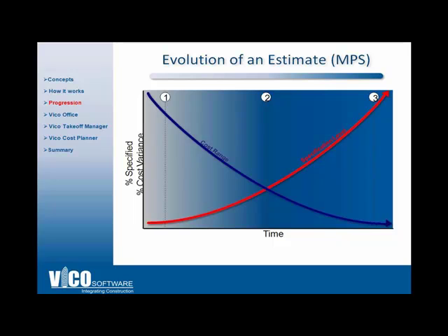And as this graph shows, the ability to make changes and the cost of those changes dramatically increases as the specification level changes. So the later you make the change in the design, the more it's going to cost, because the more you have to redesign. So it's very important that you get continuous feedback about cost and that you have an ability to continuously monitor against targets.